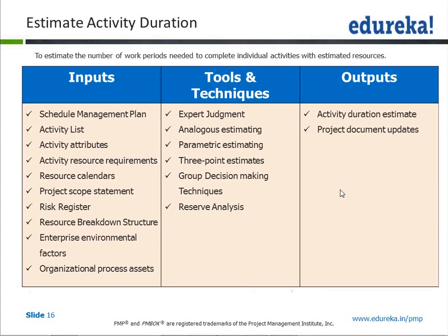There you will also see that initially you may have thought of 8 days or 10 days, but after the project was done you saw that 150 function points required not 8 or 10 days, but say 9 days or 7 days. So then you can use that. For function points, one of the advantages is that in the market you can also buy data, captured across some thousands of projects and sold, so you can use those also for your calculation.